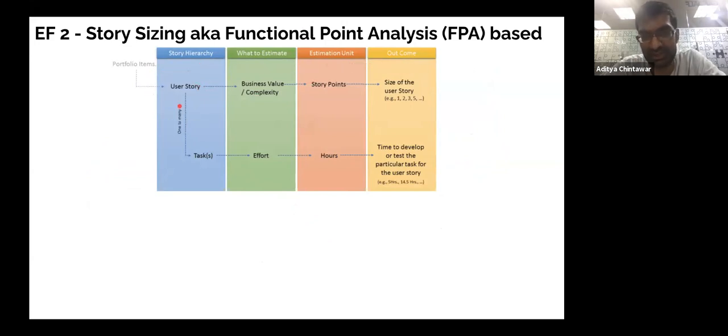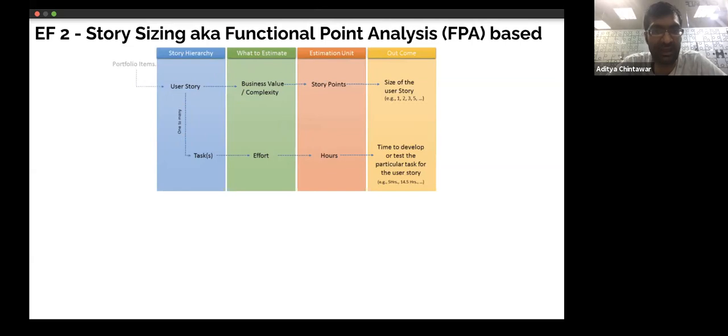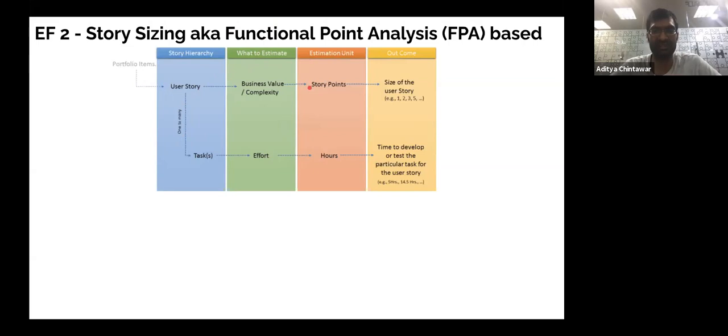Let's say there is a user story or a feature which you're trying to present. It might have a business value, feature impact, or a certain level of complexity the tech would be investing into building it. What would be the estimation story point? Whenever you present the feature in the backlog grooming or the sprint planning, if something new has come up, you always say, okay, this might take 5 story points or 2 story points. The more the product people know about the architecture and the system level, the better you're able to estimate the story points. The outcome is nothing but which feature has what.